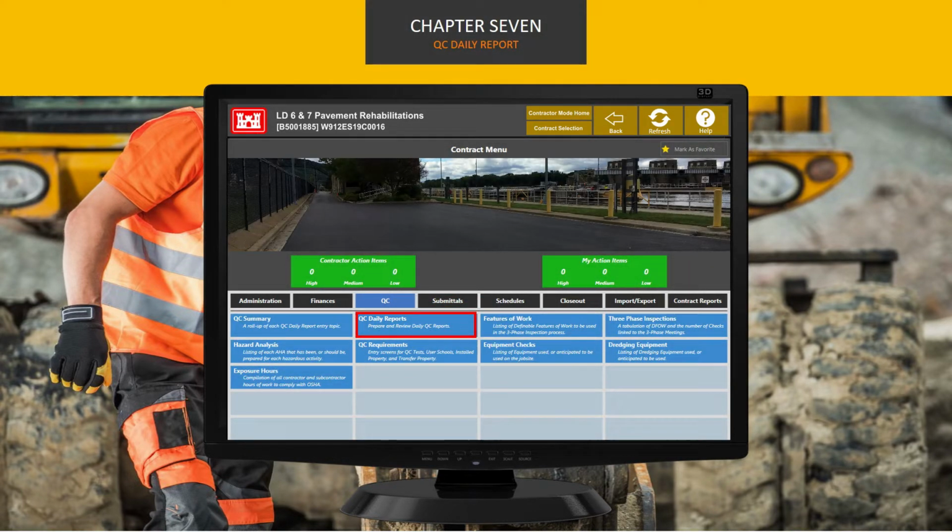A daily report is required for every day of the contract. When we say every day, we even mean weekends, holidays, and non-work days. This date will be determined by the district and will be either the notice to proceed or when construction on site begins. These daily reports continue until the contract completion date or substantial completion date, whichever occurs later.